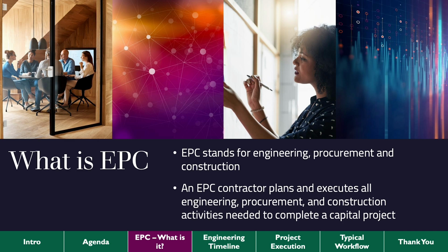So normally in the beginning, these questions have to be made clear. You are supposed to be getting all these process documents shared, besides the references, everything that you need. The problem is if I'm a newcomer, if I just got hired into an existing facility and these documents don't exist, there is nothing legally forcing or obligating that EPC firm or licensor to provide documents after they have already handed over. Completely agreed. They might do it to be friendly and for reputation and stuff like that, if it matters.